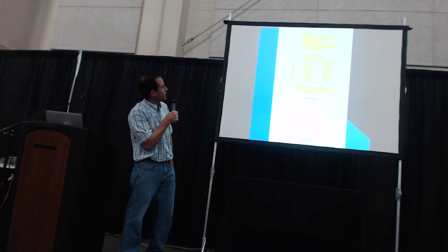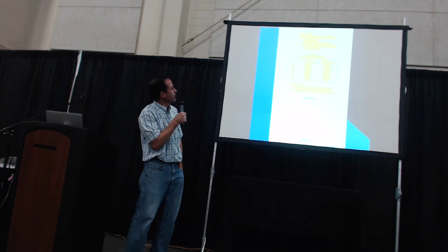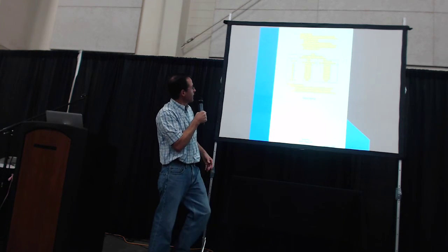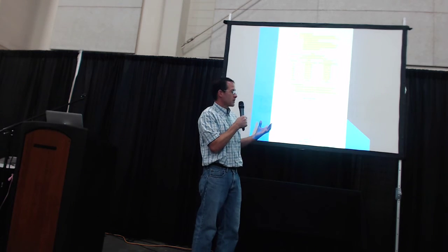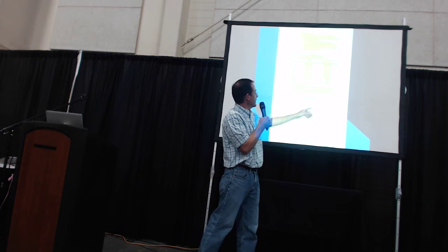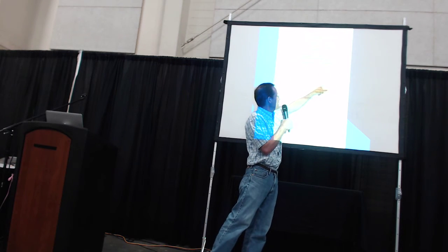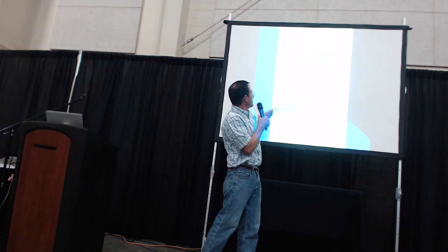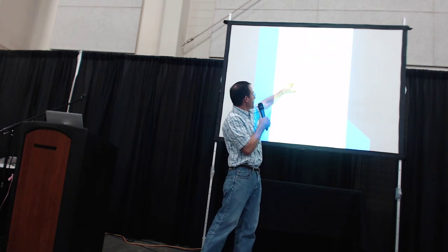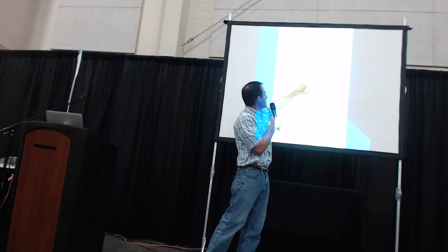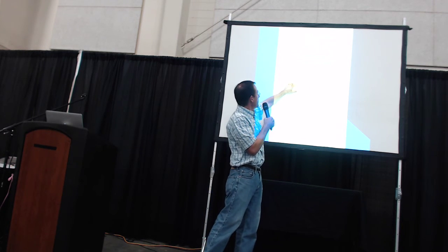The department will accept piles according to this section. They'll reject any pile driven outside of the upper deviation limits, which in this case, before the penalties apply, they can be out of location 6 inches and then up to another 6 inches before the penalty is 0. The pay factor is 0, and the pile is also rejected at that point. And then the plumbness is a 5% at that point.